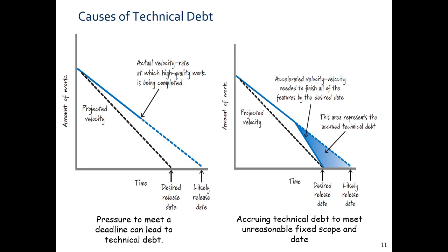The causes of technical debt can be seen in a graph: the difference between actual velocity rate and the recommended rate over time. Where the lag becomes too large — indicated by the cross-sectional area — that is technical debt. This may result from delayed or prolonged work, an unacceptable pattern of defects not being fixed, or additional functionality causing damage to existing functionalities.